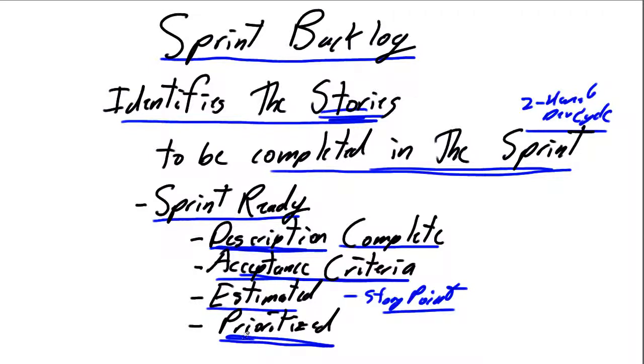And the product owner has prioritized the stories and the highest priorities have been assigned to the Sprint and are now on the Sprint Backlog.